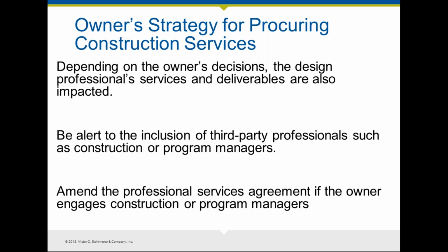Obviously, if you're working in a public arena with a public agency, they don't have as much discretion, generally speaking, about how to go about the construction process. They're oftentimes required to put these projects out to bid. So you may not have all of these variances in how the construction services are being procured, because it may well be governed by state statute. But you still need to be able to identify what the potential variances could be, and help the owner identify what their options are.